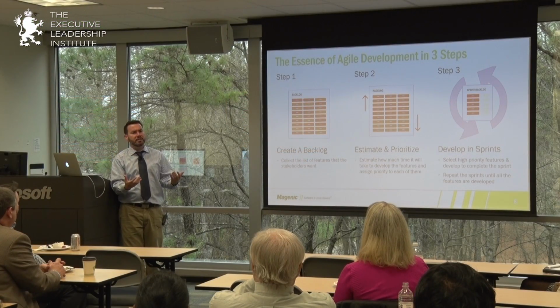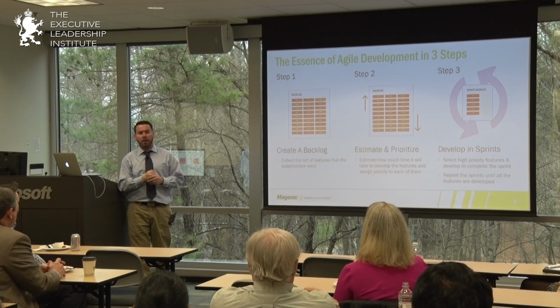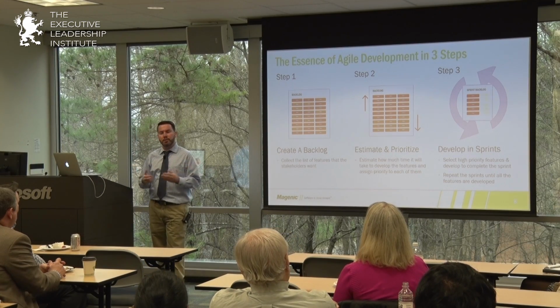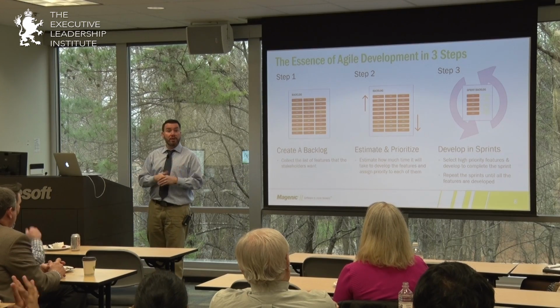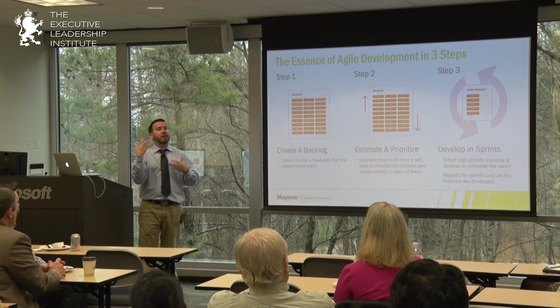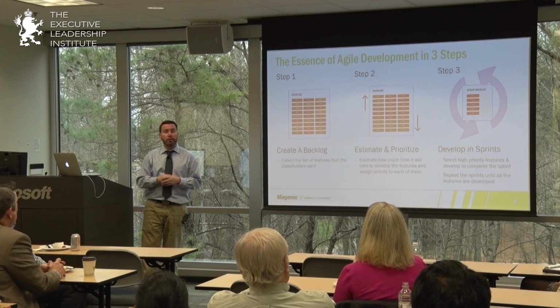We find out what the business and the users need, and we gather those all up and create user stories and features in the backlog. And then we prioritize them. What's really important to the business? What do we need to accomplish first? How do we then order those so we can be successful? And then we break those into those sprints. And ultimately then when we work in a sprint, we're taking those chunks, we're developing, we're signing off on them, and then we're moving on to another piece.